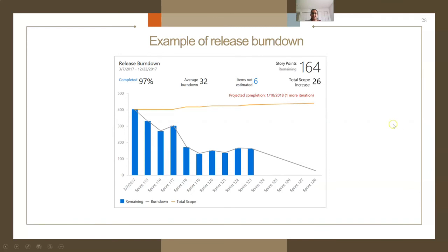And this is an example where we can see the burn down chart, which is used in most of the Agile teams. Here you can see that the beginning of a sprint starts with the highest burn down, that is, none of the team members have started burning their efforts. And moving further into the sprint, the burn down should ideally reduce and come to zero.